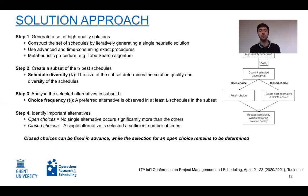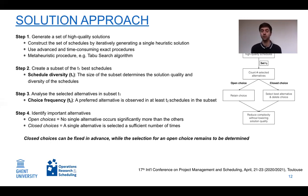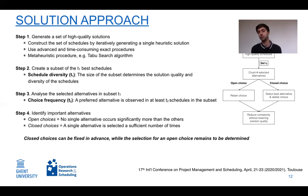Once this is done, we distinguish between open choices and closed choices. In an open choice, no single alternative occurs significantly more than others for a work package — that is, no alternative's frequency exceeds the required threshold T2. In a closed choice, one alternative's frequency does exceed T2, meaning it is selected often enough to be labeled a preferred alternative.